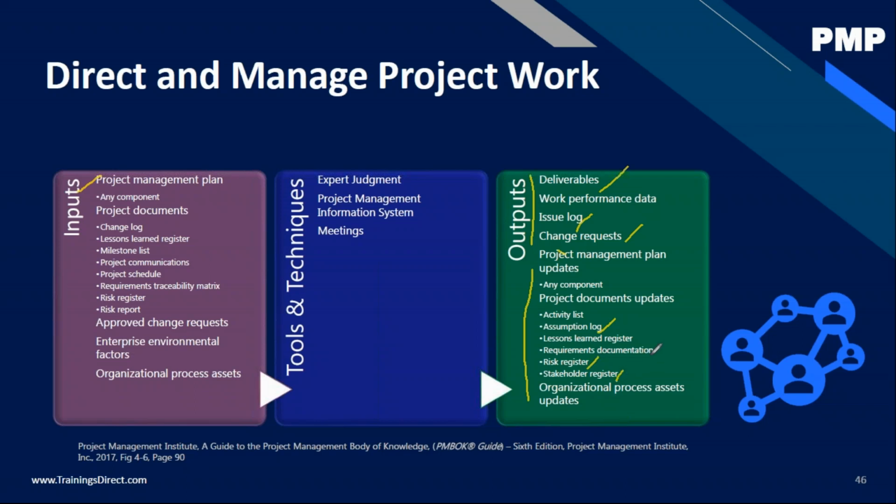Stakeholder also you can do, but requirement document, we can't just update it. If it is already frozen, then we need to put a change request to modify the requirement documents. Yeah, so some of the documents will be properly change controlled or version controlled, and some of them will be easy to just update at any time by anybody.